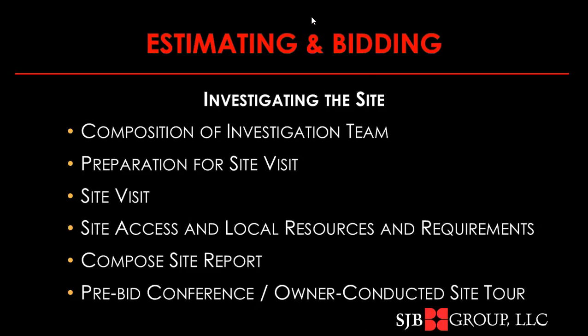To compose a site report, that's that sample report that keeps popping up, which is the next slide. And you're going to be going to some projects that will have a pre-bid conference. That may be required. If it's required, make very certain you sign whatever attendance roster it is that gets circulated there. Next.